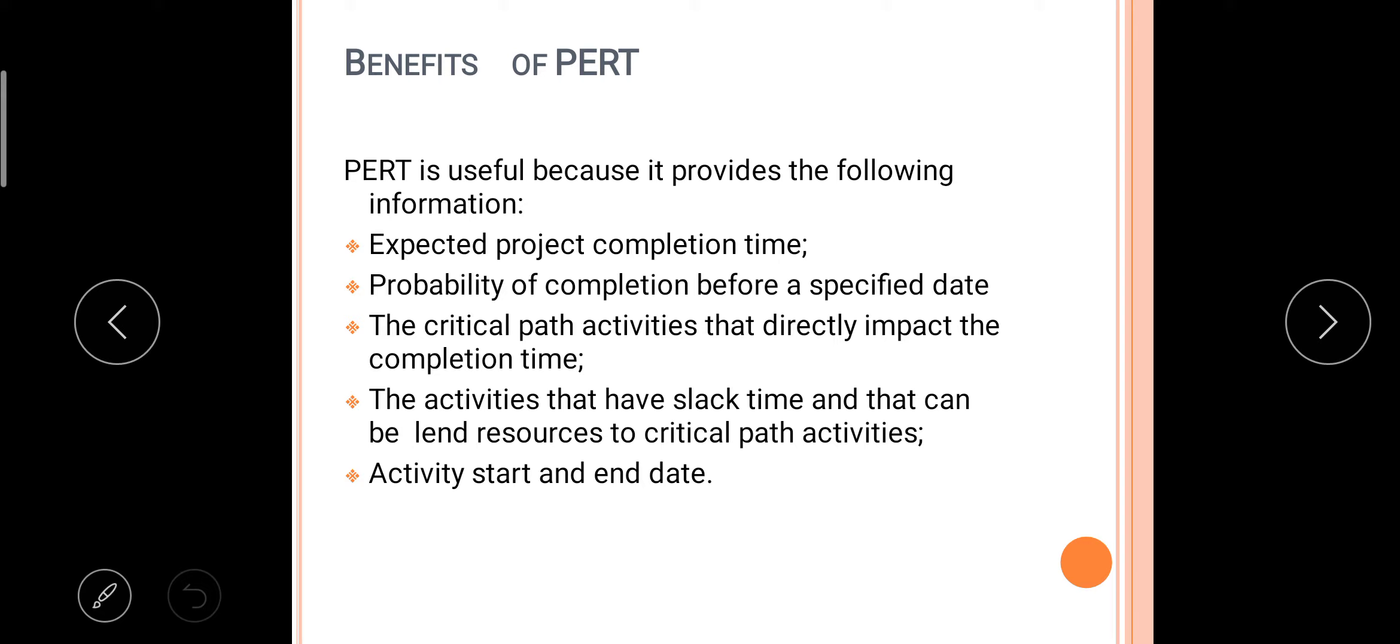The activities that have slack time and that can lend resources to critical path activities, and activity start and end dates. So everything we can identify or you can see at a glance by seeing one chart.